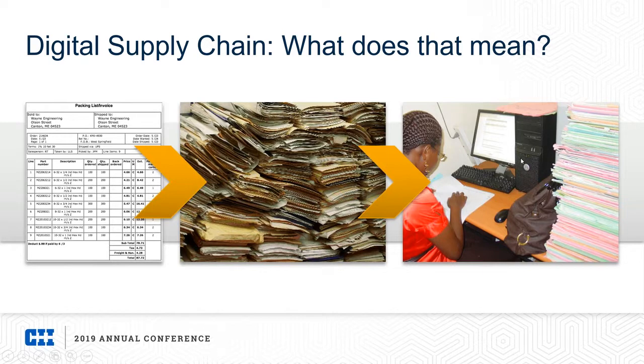There is a level of importance that is placed on this paperwork pile here. It usually starts with the MRR, your material receiving report, in that key system so that you can pay bills. The next is issuing out to construction. Really, the third piece is making sure that all the information that's included in that documentation is keyed back into a system somewhere that people can see it through other parts of the project, which is really one of the most important things that we can do in the supply chain.